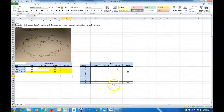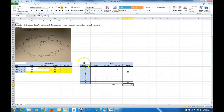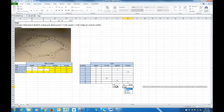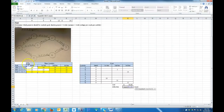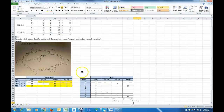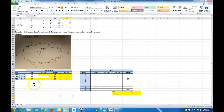What was my total cost? I go to cost and sum all of them — it's $54. And the reduction equals the max of what I started with minus the max of what I ended with — so I reduced it three weeks, which is what I wanted. It cost $54 to reduce the project three weeks, and that's the minimum cost.